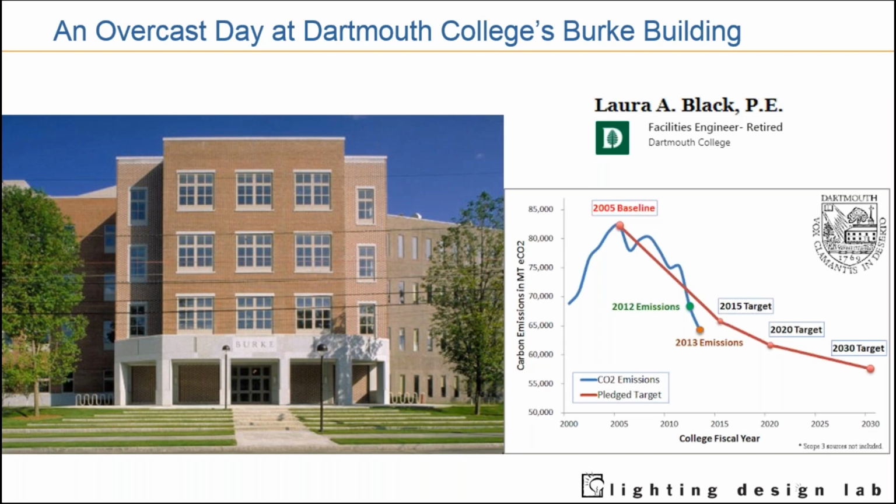Interestingly enough, and this is energy overall, not just lighting, I want to call attention to this: a lot of the lighting projects only occurred when there was another larger project in a building. And for specifically the Berg Chemistry building, they were changing out, I forget specific HVAC equipment as well as chillers in some of their labs. And their project managers said, hey, we're already going to enter this building because of these HVAC projects. If you guys want to do your lighting project alongside, you can do it.